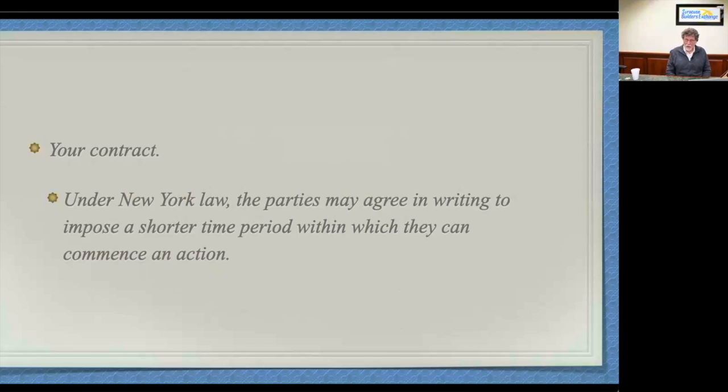So if you do that, please know about it. Please look at the contract. I see these most of the time now. They are very typically reduced to 1 year for a subcontractor to sue for non-payment, for a GC or prime to sue for one payment. Private works and public. If you look at the SUCF standard form contract, it has a 1 year statute of limitations. Okay.